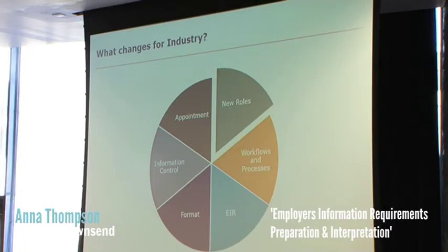There'll be different workflows, processes when implementing the BIM execution plan. The BIM execution plan is taken from the EIR document. Everything in the EIR document feeds into the BIM execution plan, which we'll touch on in a minute. But the EIR document, the employer's information requirement, and the format of information will have to be defined at a much earlier stage, resulting in a long consultation phase at inception. So when the client says, I want BIM, we need to think about running BIM workshops with that client to actually define what they want.